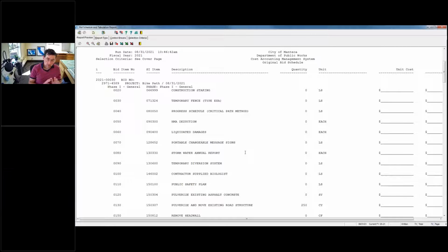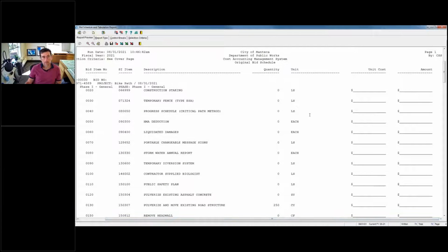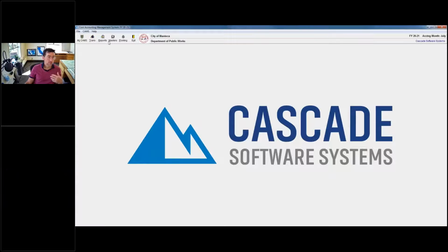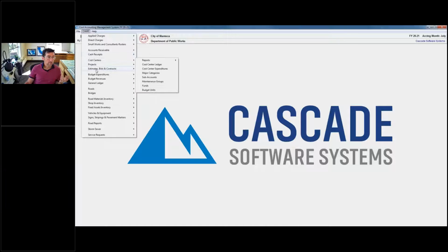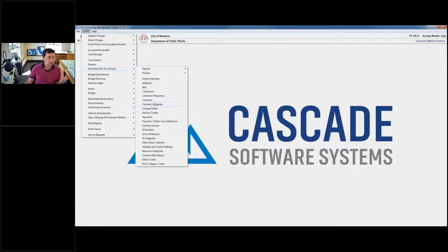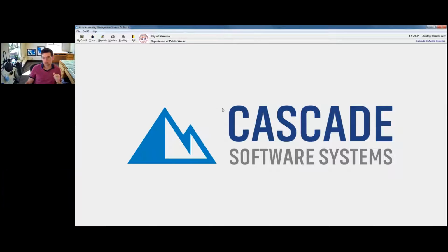I don't know. This is one of those places where you'd have to figure out, okay, how do I interact with the real world? Because these contractors are not WinCAMS users and we wouldn't want to let them into this module anyway, right? But basically the point is that what they see is these are the line items, here are the quantities and the units of measure, and no unit costs are shown, okay? So we give them their bid schedule, or we send it to the print shop, or we use the online bid platform, as you said. And then the next step is they come back, hopefully, and we get contractor responses.